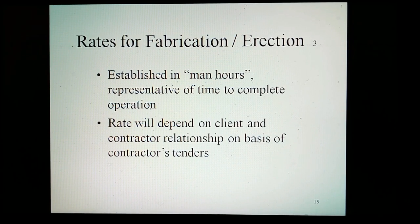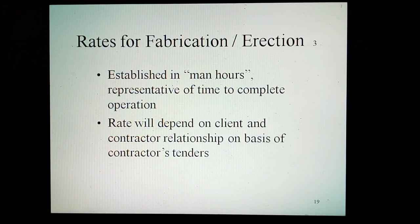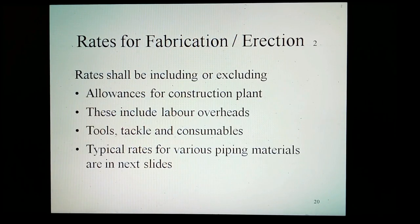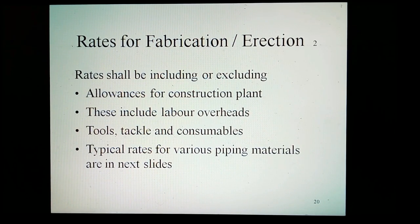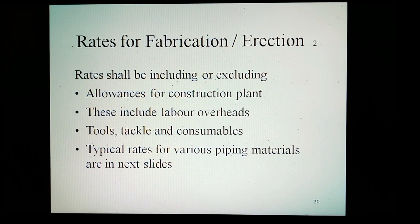Rates for fabrication and erection. The schedule of rates for fabrication and erection is established in man-hours, which should be representative of the time to complete the operation. The type of rate will depend on the client and contractor relationship, on the basis of the contractor's tender. The rates shall include or exclude allowances for construction plant, tools, tackle, and consumables. Typical rates for various piping materials include labor, consumables, tools, tackles, and overhead.